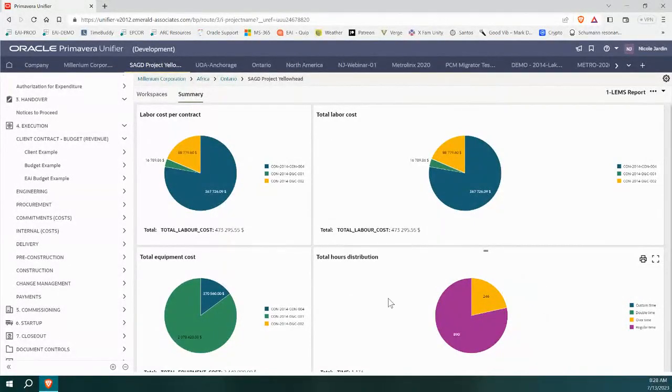And of course, you don't want the overtime to be such a huge percentage of your project. If your overtime is high, you've got an imbalance, right? The imbalance is either because you don't have enough people, you haven't resourced the right roles perhaps, or you might have another problem at the site. Maybe there's a lot of absenteeism perhaps, which is a sign of a bigger problem on your project, okay? So it could be a variety of things, but the point is you want to be able to track that every single day and do something about it as soon as you see a problem, okay?